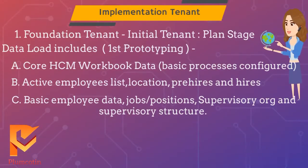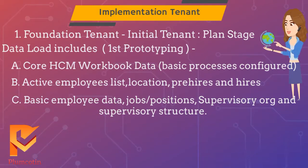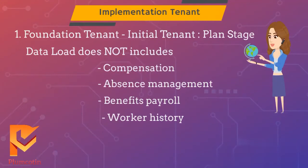First prototyping - sample data loaded in the Foundation Tenant: 1. Core HCM workbook data, basic processes configured. 2. Active employees list, location, pre-hires and hires. 3. Basic employee data, jobs/positions, supervisory org and supervisory structure. Data not included in the Foundation Tenant: Compensation, absence management, benefits payroll, worker history.